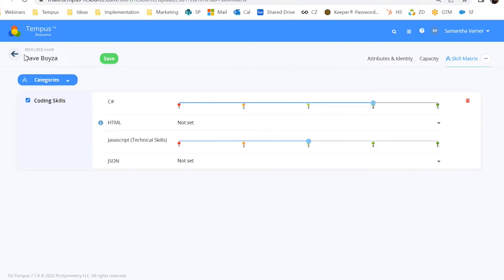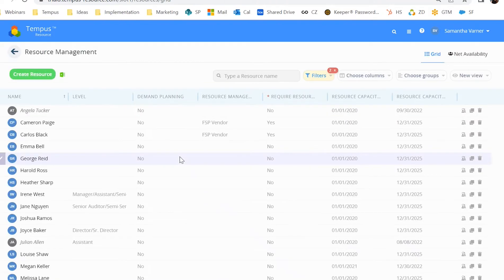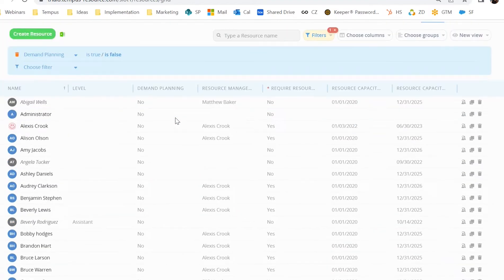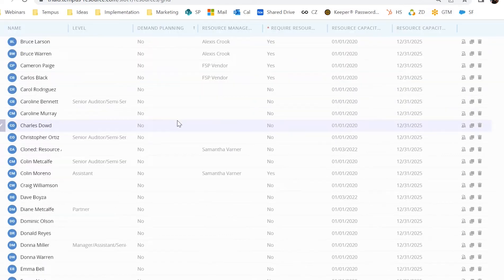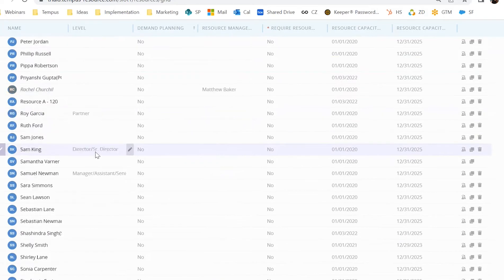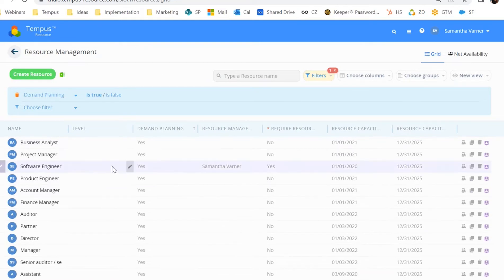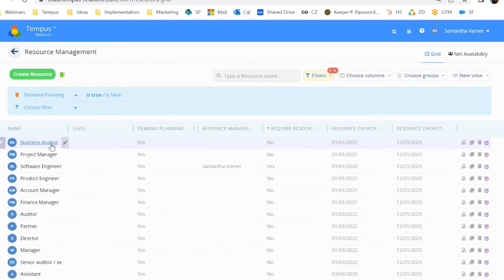Resources really drive everything about Tempest, specifically those named resources. But I also want to cover demand planning resources, because this is a really important part of Tempest as well. A demand planning resource — think of it as a generic resource, maybe a role, a skill, or a team. It really allows you to apply allocation, apply a forecast or a plan to a generic role before you know who that named resource is.